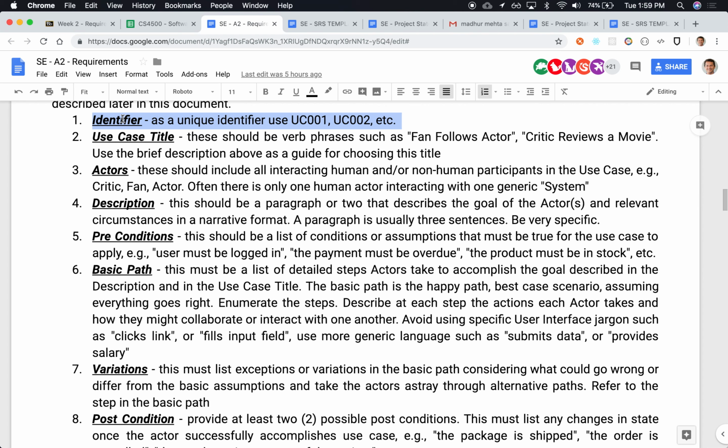If you're in Waterfall, right, a lot of effort goes into documenting this, right? And we never implement anything until all the use cases are fully documented, right? We don't write a single line of code before everything is documented. If we're in Agile, these use cases would be written at a very, very high level, okay? But then when we actually choose to implement a particular feature, we will come in and spell out in much more detail what the use case is. We don't spend as much time worrying about writing this in full detail. Yes? So it depends on what style you're using here, right?